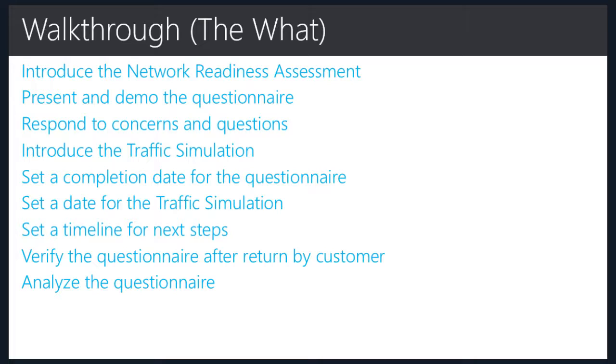Is this the deployment team or the partner? We'll set a timeline for our next steps. So when do we meet again? Who's going to be responsible for that? After the customer has sent the questionnaire back, you should verify and analyze the questionnaire to make sure it's completed and all the information that we need is in there and the information is correct.